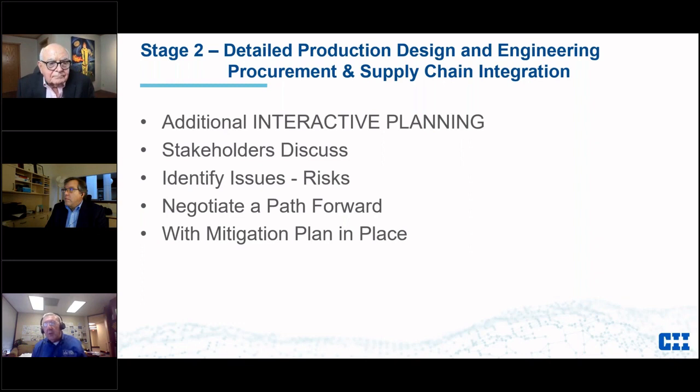Is this going to be sole source? Is it going to be competitively bid? Is it going to be internationally competitively bid? Because all these things have a different factor on the project, depending on the schedule. In the case of international, do you have enough time for shipping? Is there enough room in there to allow for the shipping and some of the issues related to international sourcing? Is cost your driver, or is schedule your driver? That comes into play here. But anyway, we come up with a strategy.